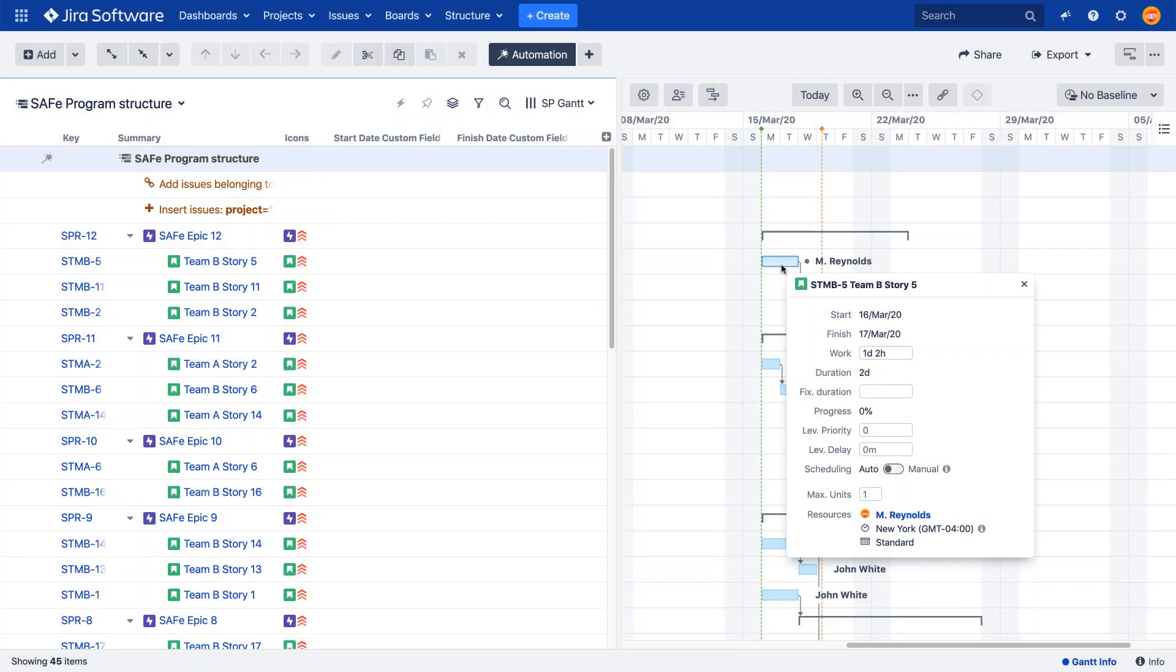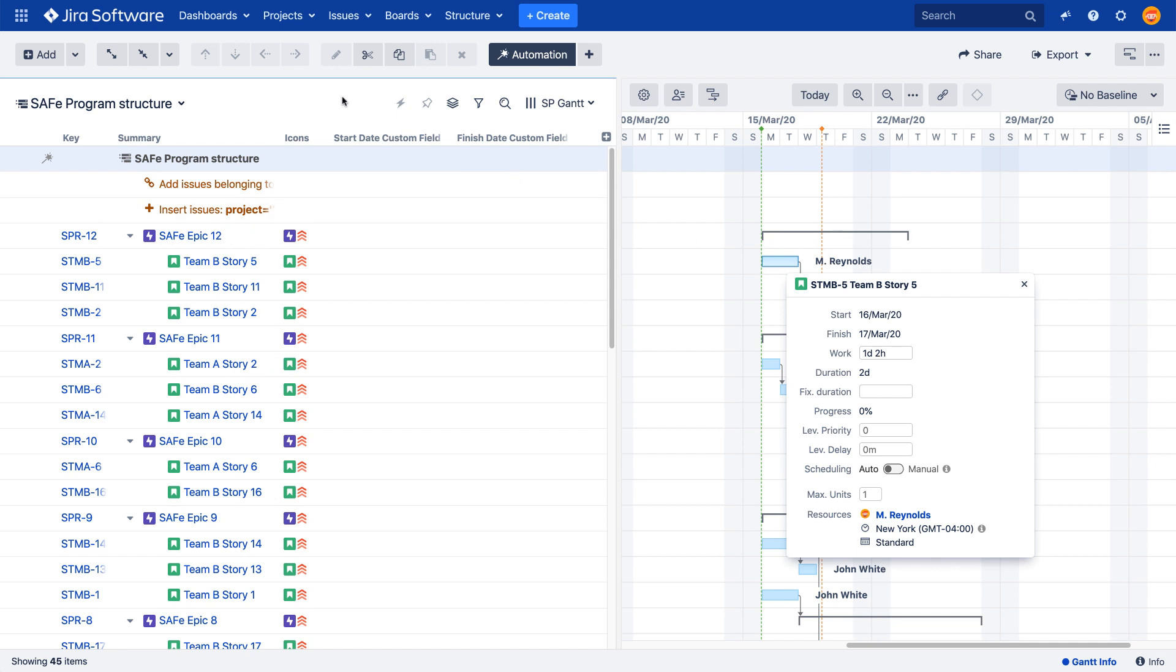Typically, when you're working with automatically scheduled tasks, the start and finish dates you see on your chart only exist within Structure.gantt. These dates are calculated using the estimates, dependencies, and other related data taken from Jira, but they are not visible outside of Structure and Structure.gantt. Writing these dates to Jira fields makes it possible for users to see how each task is scheduled by simply opening its Jira issue page.